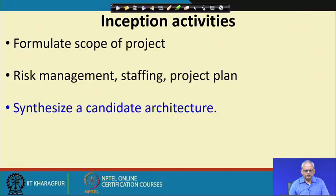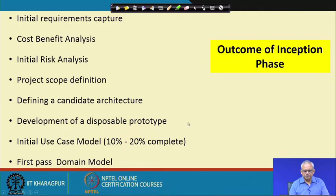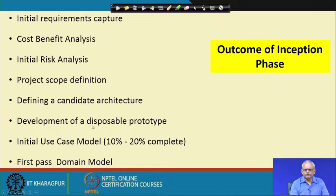During inception, the scope of the project is determined — that is, the features. Plan documents like risk management, staffing, and project plan are made, and an overall architecture is determined based on project requirements. The outcomes of the inception phase include: initial requirements capture, cost-benefit analysis, risk analysis, project scope definition, defining the candidate architecture, and development of a disposable prototype to study different architectures, along with an initial use case model and first-pass domain model.